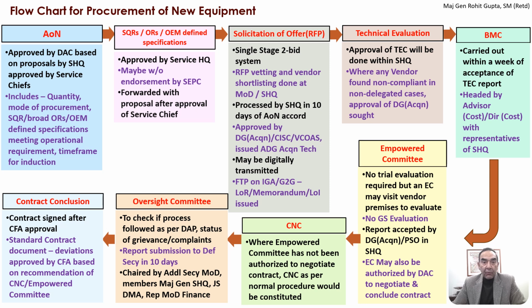An oversight committee would be here also to check whether the process is followed as per the defense acquisition procedure, also to check the status of the grievances or complaints, and they would render their report to the defense secretary in 10 days. It's chaired by the additional secretary of the MOD and a 2-star member from the service headquarters, a JS equivalent of the DMA, Department of Military Affairs, and the rep of MOD Finance would constitute the oversight committee. The contract conclusion is after the CFA approval.